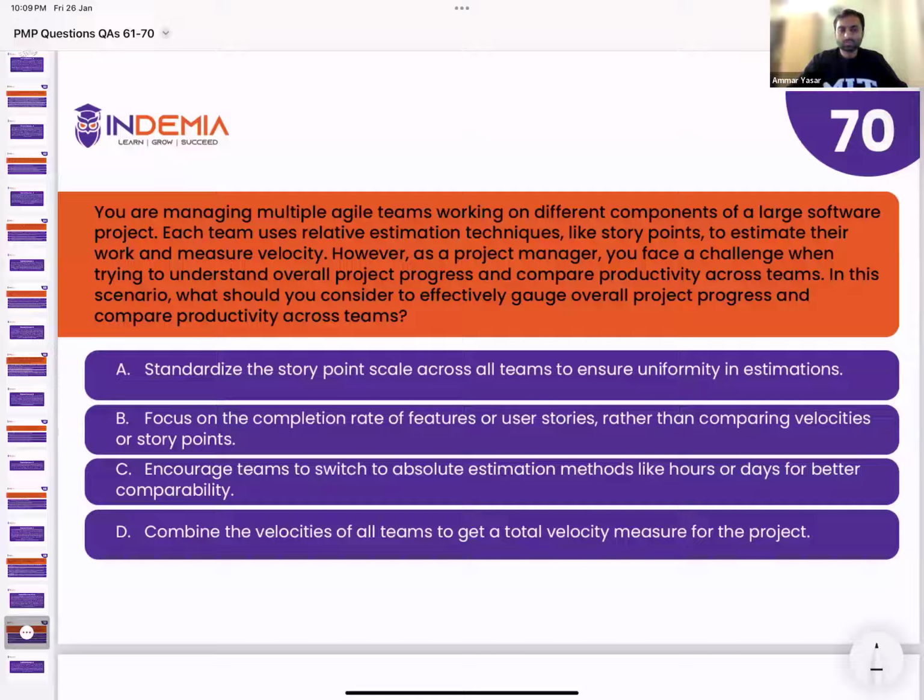Then it means just use hours. Hours are the best way of standardization. That's the simplest way. You cannot standardize story points because story points for me are different, for somebody else are different, because they are relative in nature. So for example, when we say 10 story points, it doesn't mean 10 hours. Maybe for me, 10 story points is different. For Lela, 10 story points is different. For Cindy, it is different. For Madan, it's different. That's the flexibility we have. So different teams, based on their experience, use story points differently. So we do not standardize at all, right?